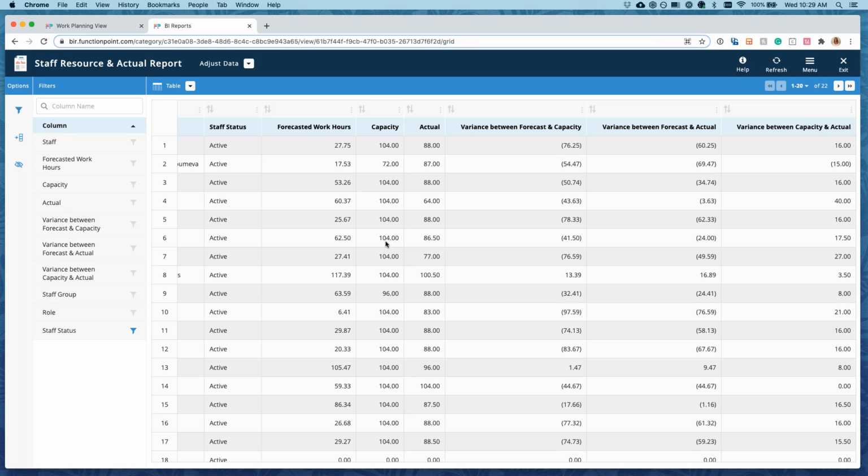Okay, that's something we can take offline as well, so we can get through the rest of the content. I'm happy to set up a call with you, Jennifer, to review that in greater detail if you like. What you're talking about right now, I'm not sure that this is actually the right report for that. So Jennifer, we maybe want to dive into that because there's a possibility with these actuals, if you were to add the forecasted, that would almost just double your hours and probably give you a number that makes absolutely no sense. Because the actuals is the amount of time that has been tracked within the system, where the forecasted is really just what's been estimated. So I'm not sure if this would be the right report for you.